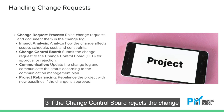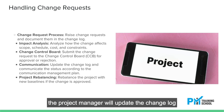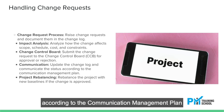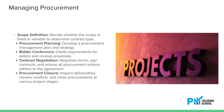3. If the change control board rejects the change, the project manager will update the change log and communicate the status according to the communication management plan.